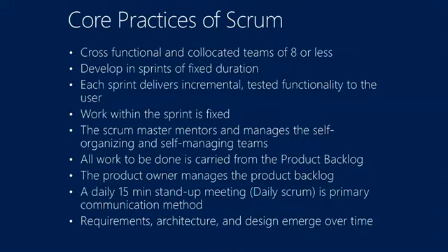And one of the side benefits that's really nice about this, if you employ what Mr. Forte here was saying in his previous session, is that you can do re-estimation for each sprint, allowing you to be more accurate in your estimations, using that cone of uncertainty to your advantage, as he said.